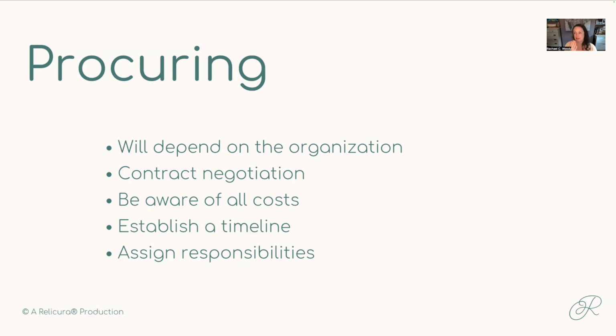But if you offer to sign it for 3, 5, 10 years, that annual cost over time can be greatly reduced. So asking those types of questions, especially if you know you're not going to be hopping products for at least a certain amount of years, can be a great lever to pull if you're looking at a pretty big price tag, but still have major budget constrictions.